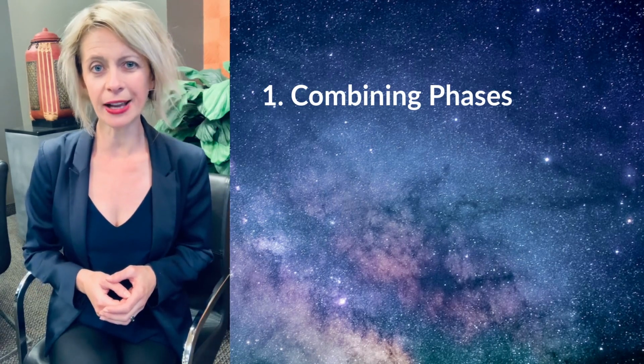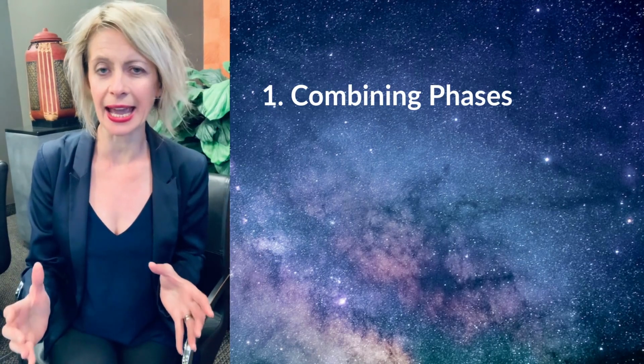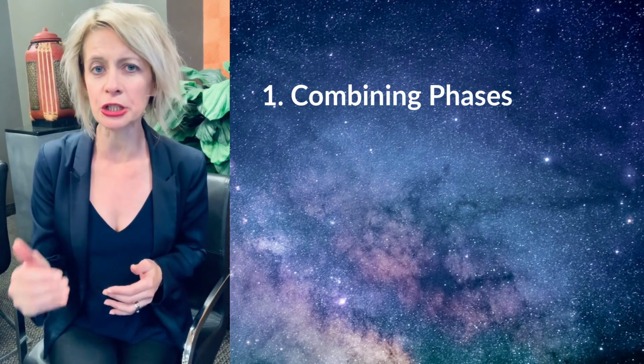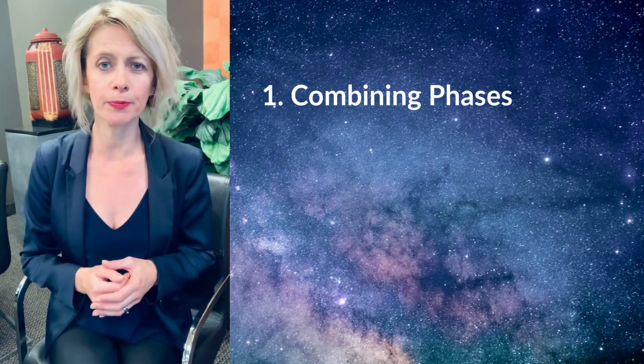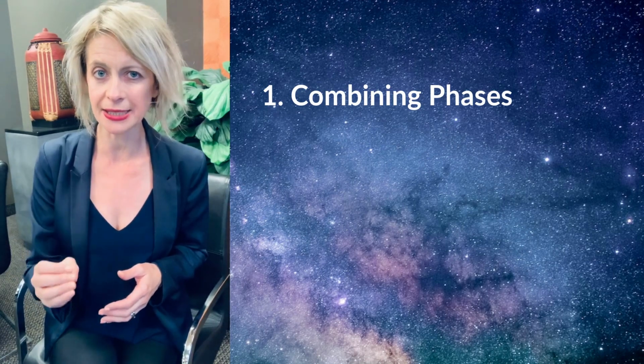And I know I might surprise some of you, but the stage gate model can be as flexible and agile as you want it to be. And I will go over 4 different ways that you can use. So let's just get into this. Number 1, combining phases. By combining phases and reducing gates, it takes quicker to move from the assess phase to the execution phase, which I recommend for projects with a low level of uncertainty or low complexity.